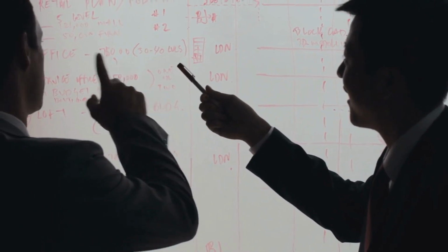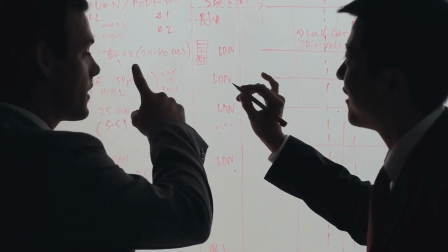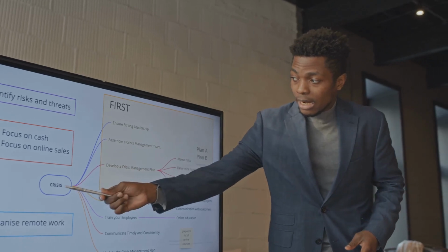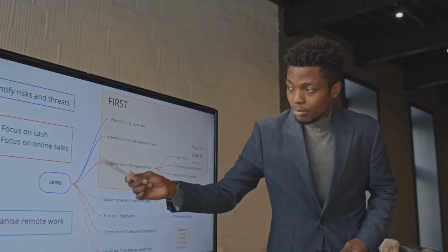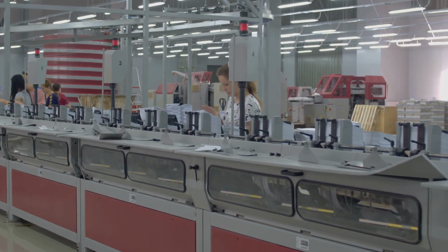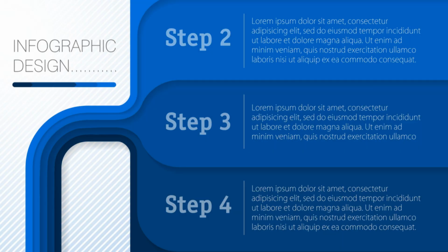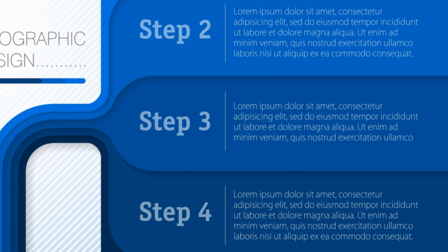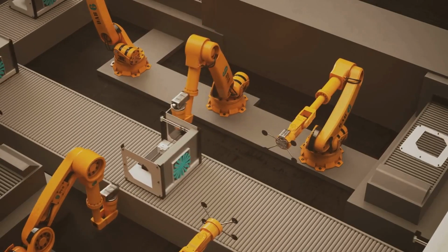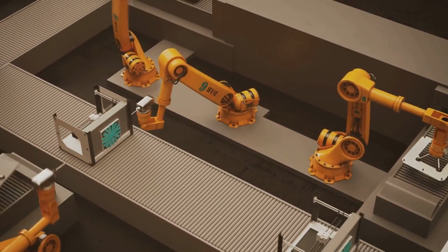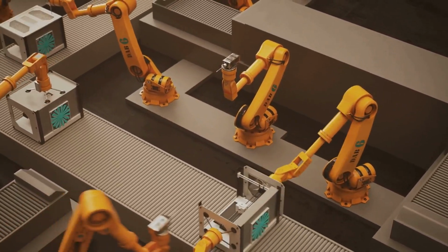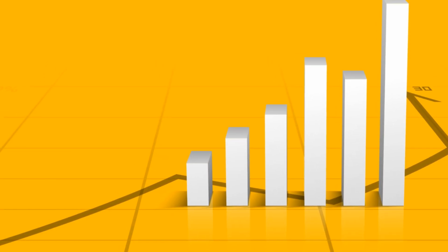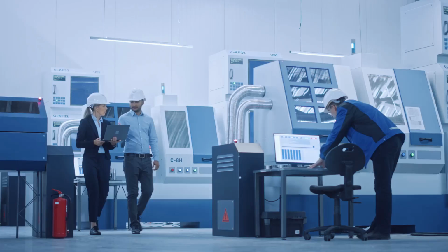First, define the goal. Money now and in the future, or honestly, whatever your personal equivalent might be. Then map T, I, and OE, so you really know your 3 levers. Spot the constraint, which is just where work tends to queue up. Run the 5 steps: exploit, subordinate, elevate, and then, well, repeat. Sync with drum buffer rope. Let the constraint set the pace, protect it with buffers, and signal flow with ropes. If you follow this loop, you'll watch lead time shrink, on-time delivery soar, and profits grow.